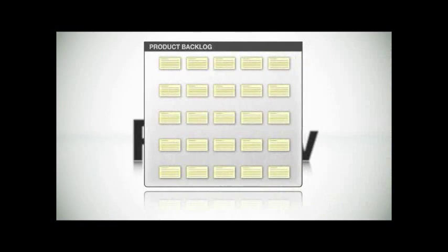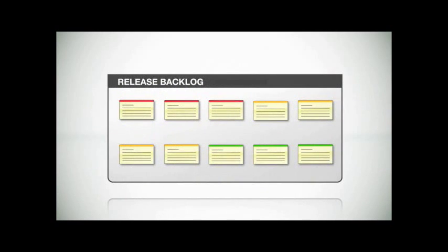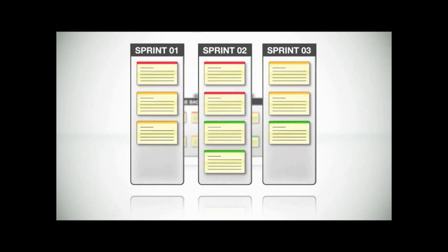So let's quickly review everything. In Scrum, you work with this, a product backlog, which is nothing more than a list of features that we call user stories. You then break down the product backlog into one or more release backlogs. And for a given release, you further break up the release backlog into a number of sprint backlogs, which are essentially short duration milestones throughout your project.